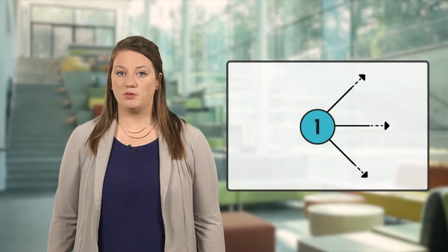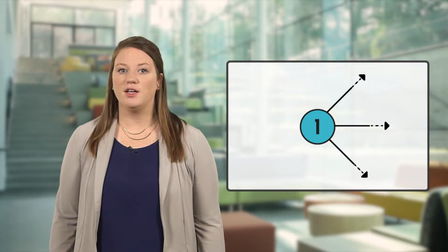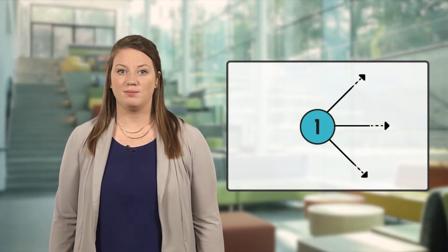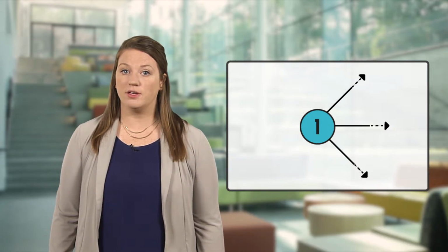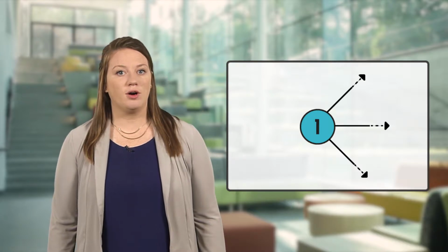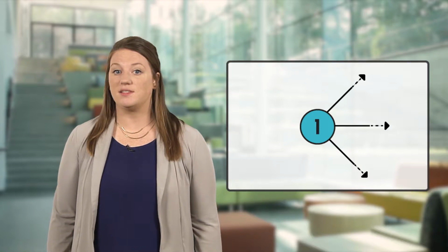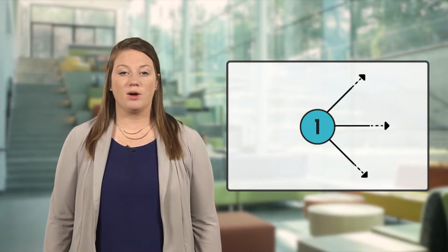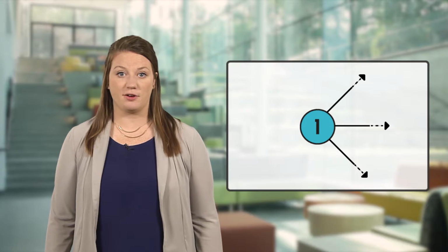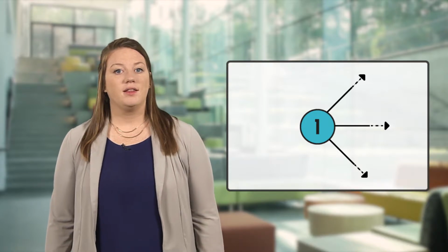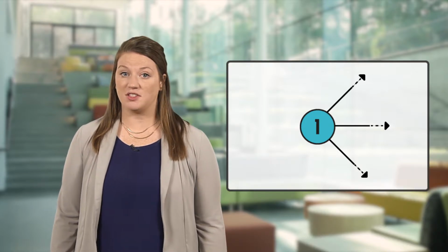It depicts a network or graph with nodes and edges. Edges are the lines that connect the nodes. In a PERT chart, the nodes, which represented tasks in the CPM chart, now represent milestones. We talked about milestones earlier in the course. Recall that milestones are not time-based, so each of these nodes represents something happening, usually a work product being produced or some event occurring. The tasks are represented by the edges.